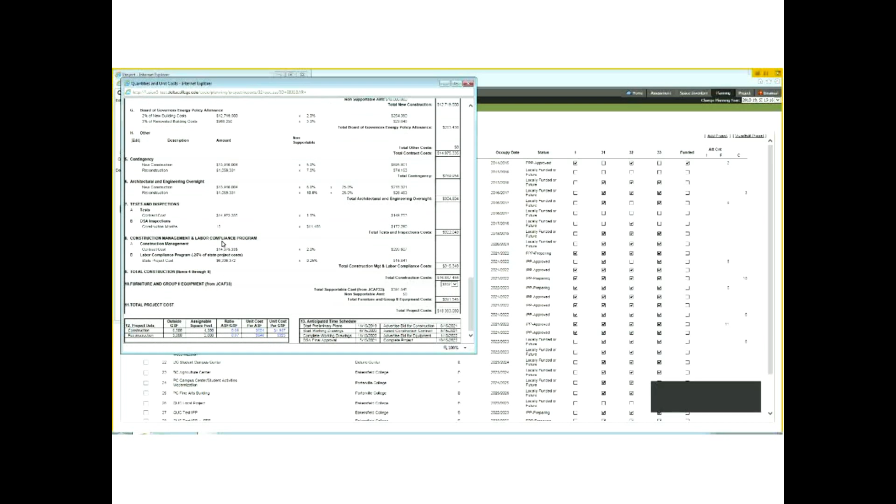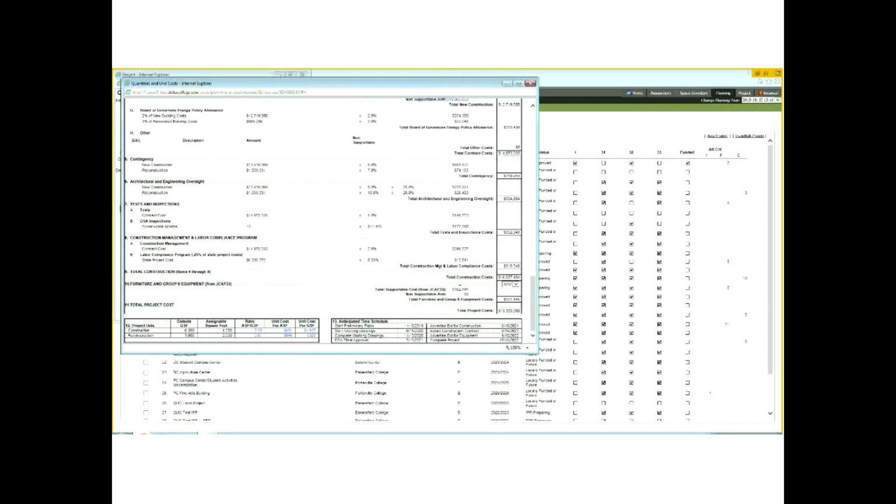But again, schedules change from year to year when you're developing an IPP and your FPP, so you'll want to make sure that these dates still reflect the plan and the schedule, and you'll want to make sure that these dates also are in line with the funding release for capital outlay and state funding. And again, outside GSF, you'll have to update that to make sure if there's any changes on the JCAF 31, these numbers would be read in assignable square footage. You'll want to make sure you clear that and update that to get the most recent information.